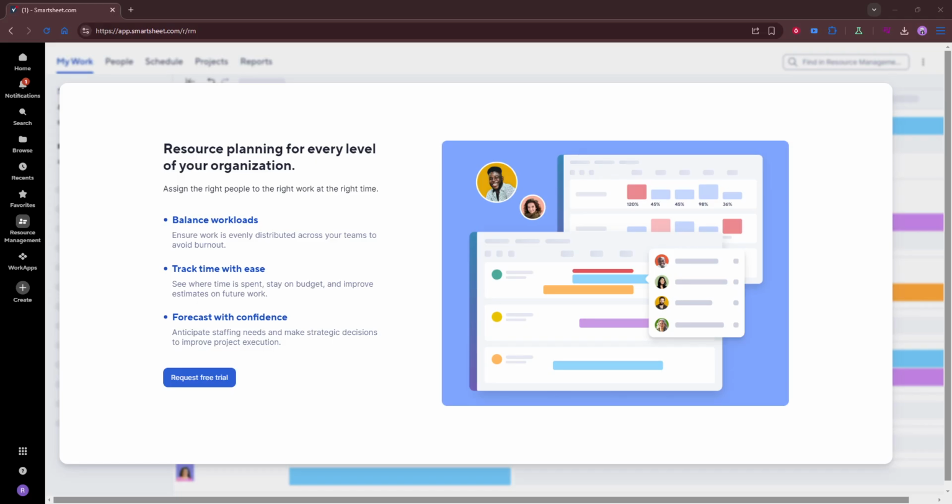Next, enter either planned hours or actual hours, depending on how your team works. Planned hours are helpful when you're forecasting effort ahead of time and trying to balance workloads before work begins. Actual hours are useful when you want to record what was truly spent on tasks or projects. In some cases, teams use both so they can compare expectations against reality.